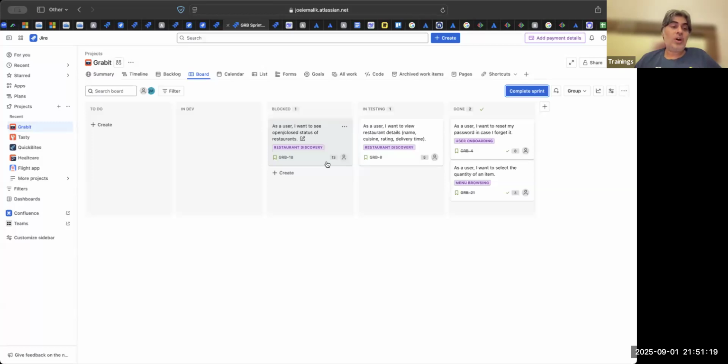I had to do sorting, hashing. There were other things, I had to fine tune the query, whatever. It was a new thing for me. I couldn't figure it out. So lesson learned: if it is something new, and it is a 13-pointer, a complex story, then ideally split it up. If splitting is not possible, then maybe 2 people can work together on that story. Something like that we can learn from this.